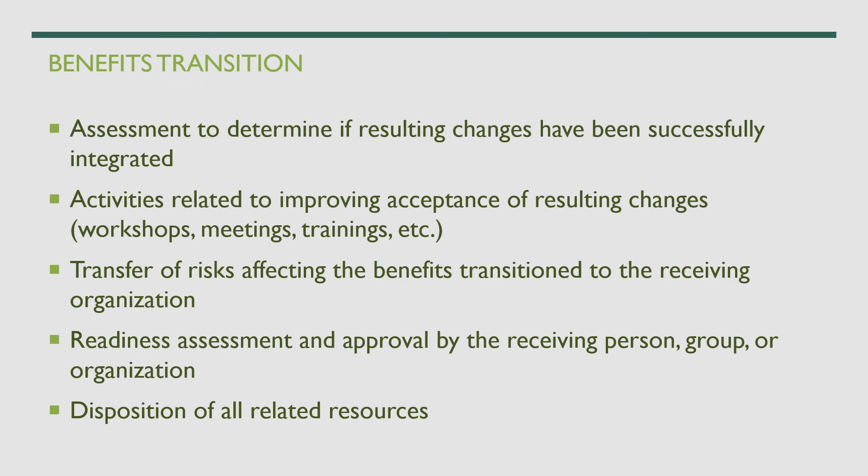Further activities include assessment to determine that resulting changes have been successfully integrated, leading to improved acceptance of those changes. You want to sustain and transition everything — informing the receiving team of areas needing improvement and activities to perform, including workshops, meetings, and training. The transfer of risk affecting the benefits transition to the receiving organization is a very, very important activity. As a program manager, you must transfer the risk to the team or organization receiving the program.